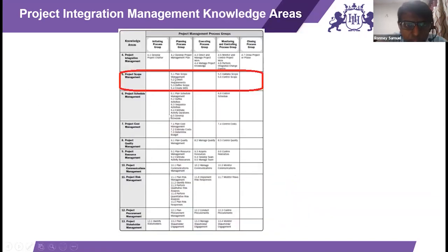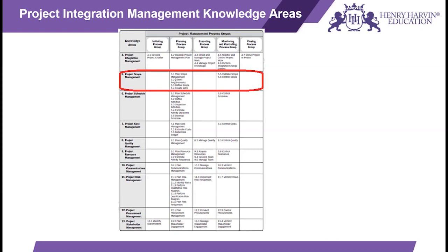Let me see. You have your part, which is collect requirements and define scope. They will produce a document which would be very clearly describing what all things are there. So tomorrow, if you get a problem statement, you just go to these documents coming out of collect requirements and define scope to see whether it is included there or not. But we discussed earlier that this scope, defined in the beginning of the project, is also iterative. It gets more refined as and when the project proceeds ahead.